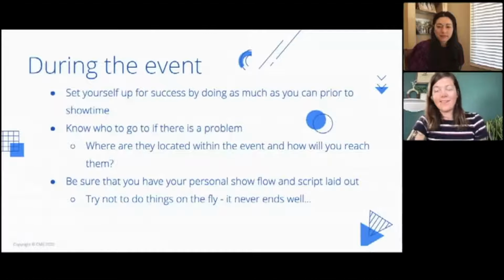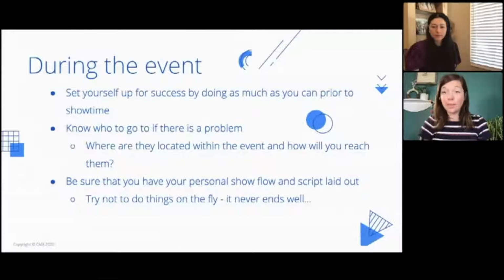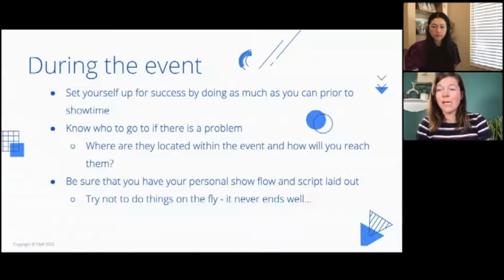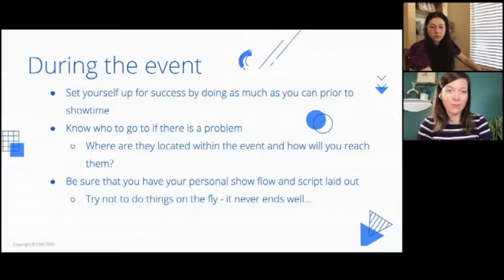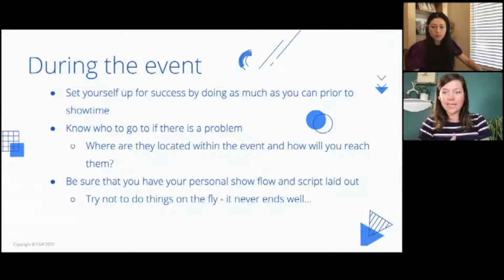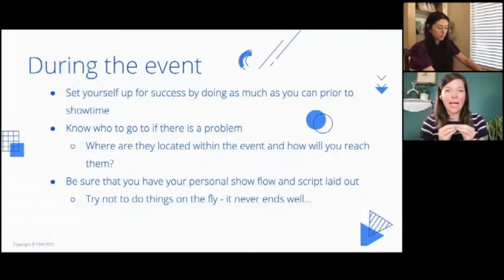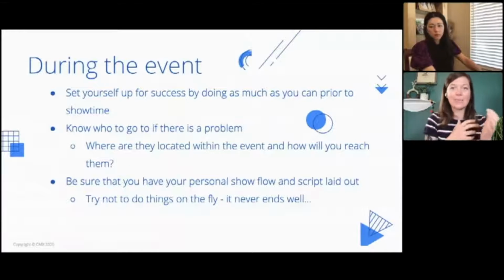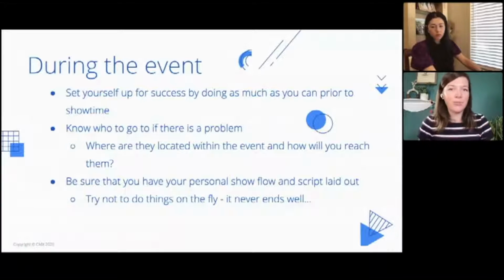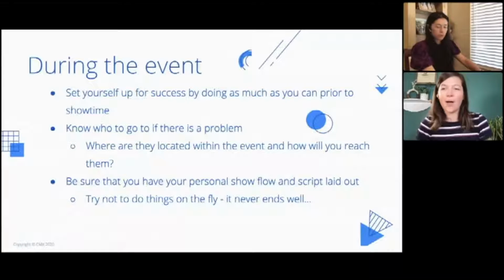So during the event, it was really important we set ourselves up for success as much as we could before the actual showtime. We gave speakers, sponsors, volunteers, everybody access to a test event we created so they could play around and practice for 2 days before the event. Like Anne-Marie said, it feels like there would be less logistics, but because we have that technical aspect of it, it can make people feel a little bit more nervous.